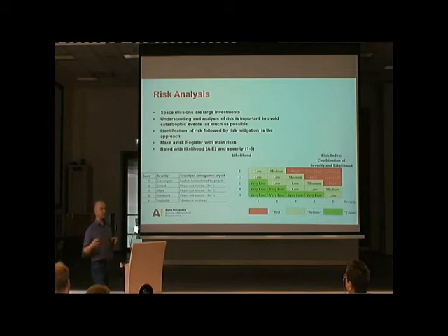So you have to prepare yourself also for alternative scenarios. What happens if, I don't know, Hungarians are not delivering the radio? What are we going to do? Because it's outsourced and their company is very small. Maybe it's bankrupt.